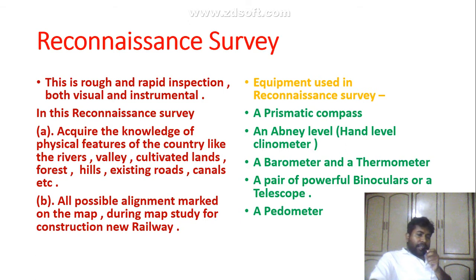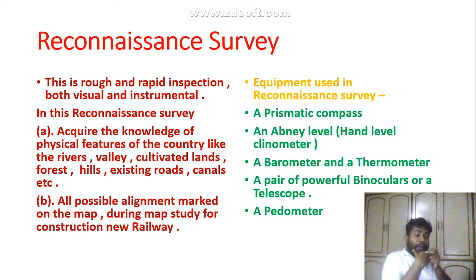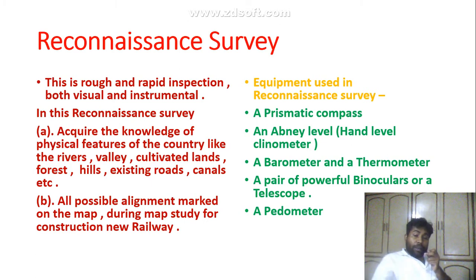Reconnaissance survey is a rough and rapid inspection, both visual and instrumental. In this survey, knowledge of physical features of the country is acquired — such as rivers, valleys, cultivated land, forest, hills, existing roads, canals, etc. All possible alignments are marked on the map during map study for construction. Equipment used in reconnaissance survey includes a prismatic compass, hand level or clinometer, barometer or thermometer, and a pair of powerful binoculars, telescope, or pedometer.